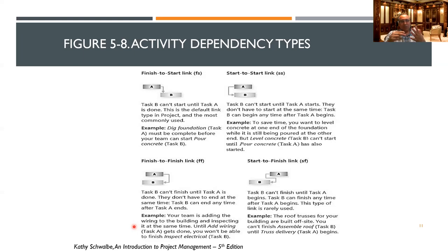So maybe his inspection is going to take half an hour, 45 minutes. So you are going to finish both at the same time. The inspection is going to finish at the same time, and your electrical wiring is going to finish at the same time. They are both linked. They are linked through the finish. They don't have to start at the same time, but the requirement is they have to finish together. He cannot complete the inspection until you finish the wiring. Is that clear? Okay, sir. Perfect. Yes. Thank you. Okay, good.